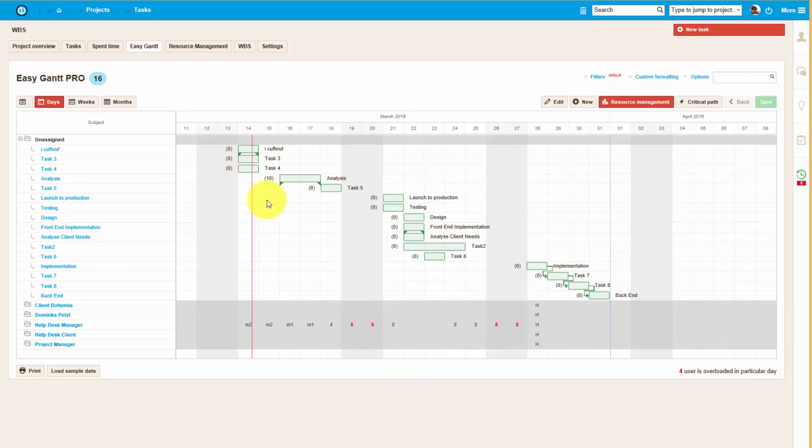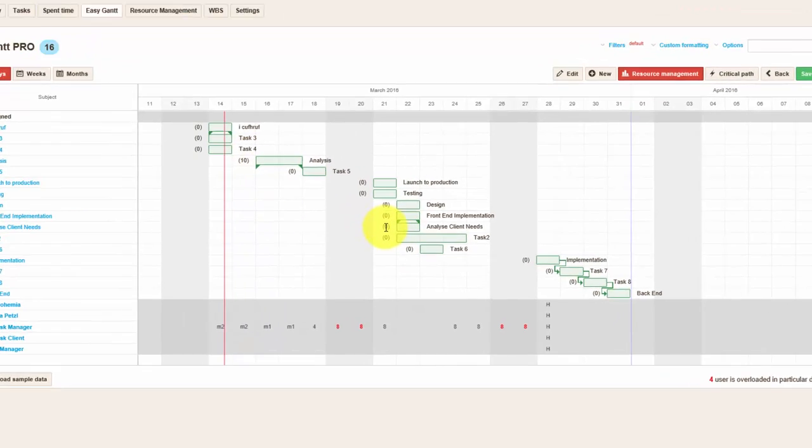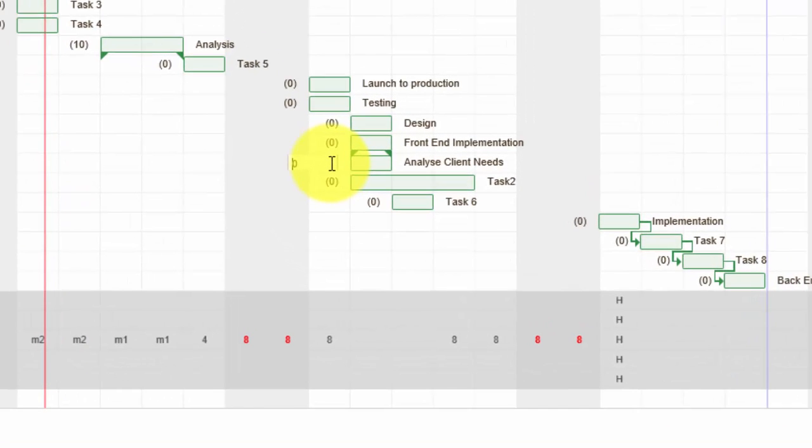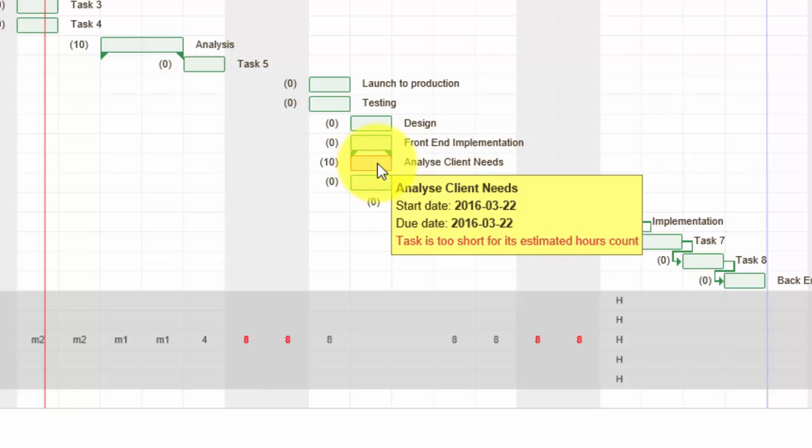Now let's look at the tasks. To adjust the total number of hours required for a task, simply double click on this number in brackets and write the correct time estimate for the whole task.